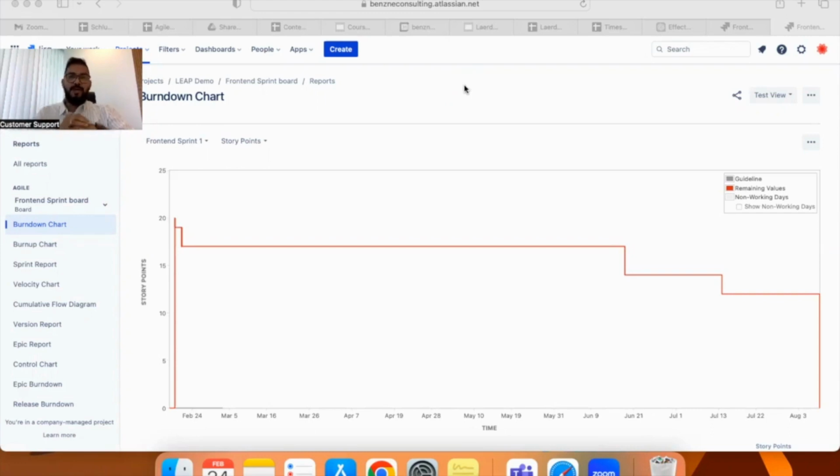So the first tip I want to share with everyone here is when we start the daily stand-up meeting, it is important for us to understand where we've come with respect to what we had planned. So the first tip is open your Burndown chart at the beginning and understand what is the work remaining with respect to what we had planned. So this gives an idea of what is the remaining work to complete the sprint and what is the confidence level of the sprint.